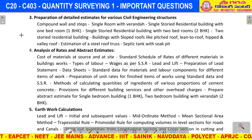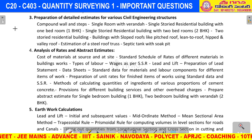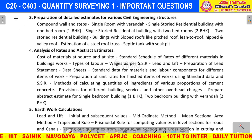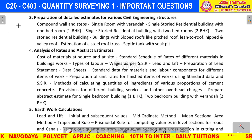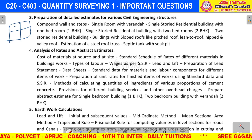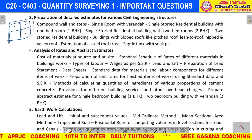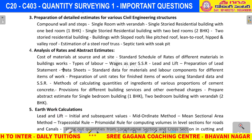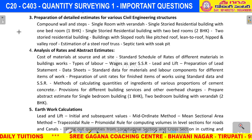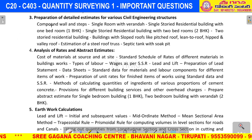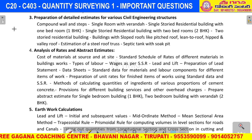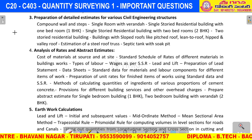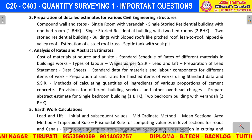For the Detailed Estimate, there are 2 short answer questions and 2 SA questions worth 22 marks. Given a plan with a hall, bedroom, and kitchen, we calculate quantities for different items including foundation, footings, quantity of materials, and quantity of work. The key items are: CC bed, earthwork excavation, footings, walls, plastering, flooring, and slab.